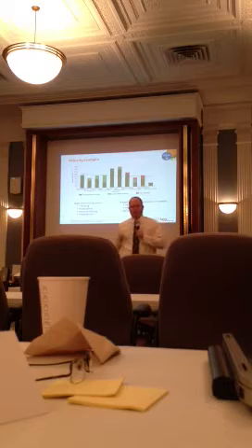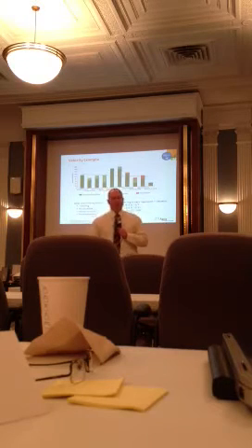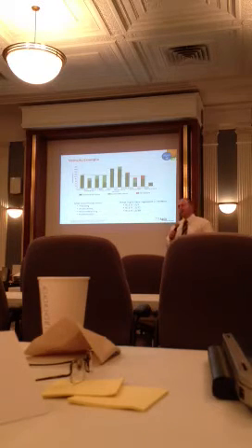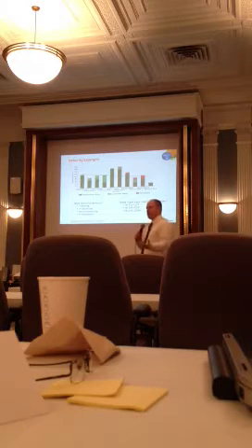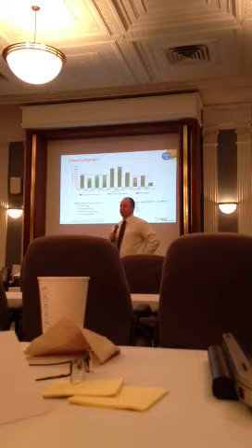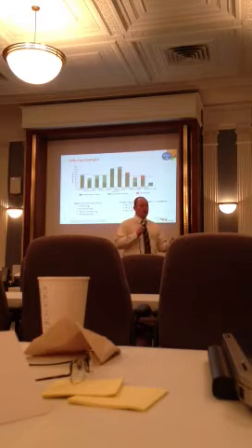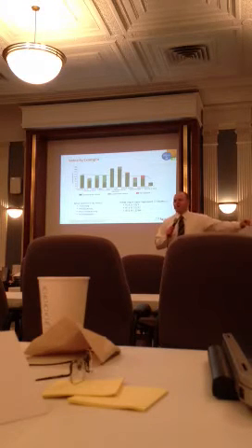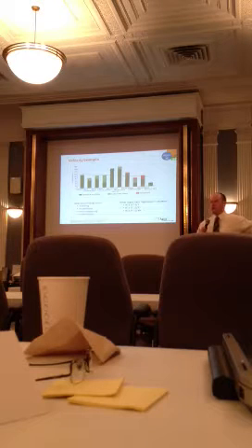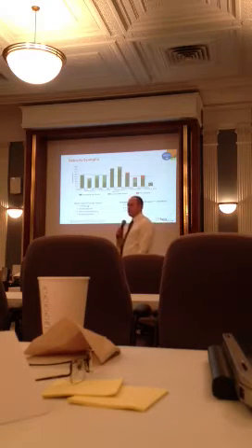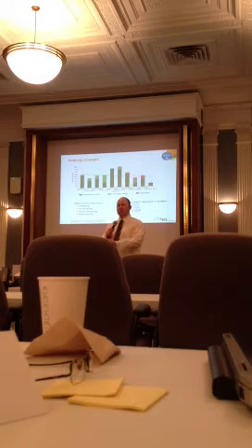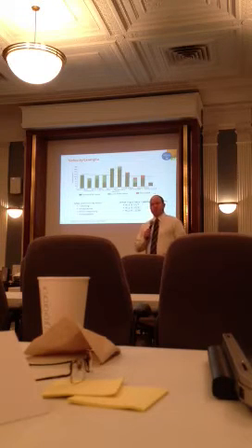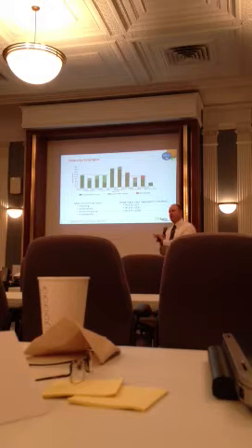So now I look at this work that comes in, all of this additional work. And I do an evaluation on it, and I was like, okay, somehow I need to increase my velocity. I was like, okay, does any of this work map to what that Skill Factory Scrum team is trying to learn? And it did. So I took all of that work that the Skill Factory Scrum team was trying to do, and all of the work that mapped to what my product owner had asked for, additional work that came in, and I gave them all of that work. Right? So I used 2 additional people from that skill factory team, and you can see it made our velocity go up. I was able to commit to more work. Did that make sense?